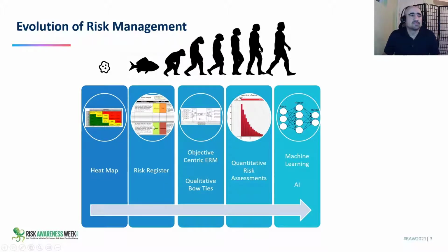Then you can move to things like risk register, which are not that good either. There's some cases where risk register can be useful. I'm going to give you an example. If you're working in process safety, a HAZOP is a kind of risk register. It's just super structured from all the subsystems and the components of those systems with all the potential failure modes. So it's kind of a very, very large risk register. I remember doing one fairly big HAZOP for all the operations from an isolated mining site, everything that had to do with explosives. So from the shipping, putting on the boat, the unloading of the boat, how you bring it to the depot. So all the steps, all the explosives and the accessories with all the failure modes. It was a fairly big endeavor, but it's very thorough. So risk register in some cases can be good, but it's very limited.